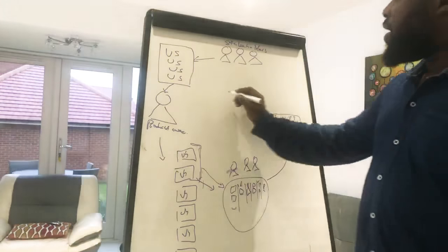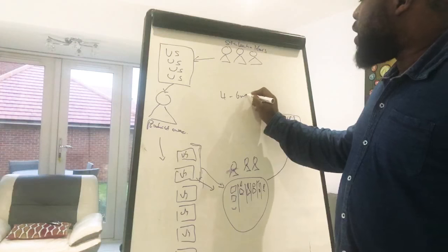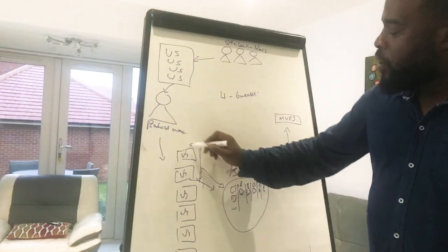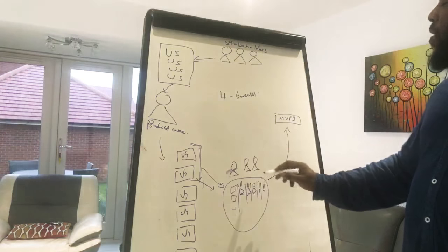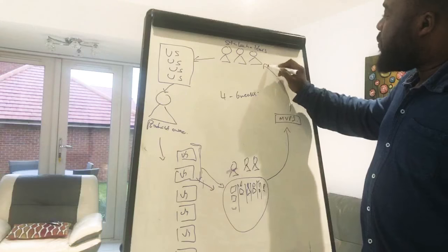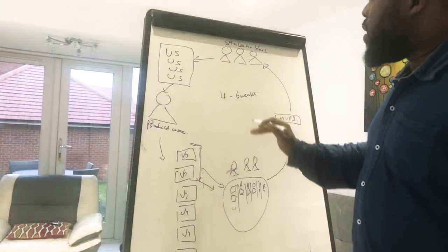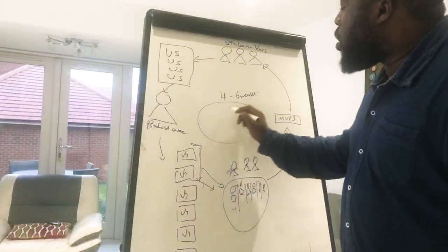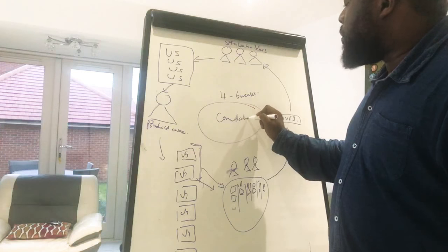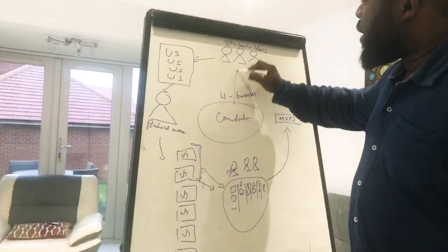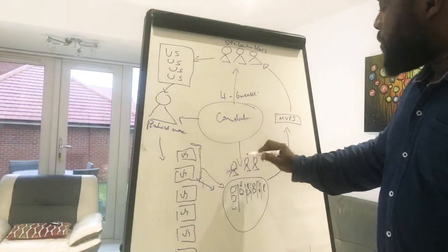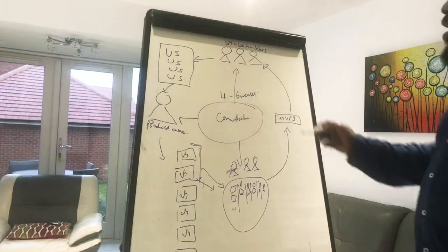So you're looking at a 4 to 6 week period where you say, okay, within the next 4 to 6 weeks, what exactly are we going to deliver to the customer, which is the most important thing. You deliver that minimum viable product, the customer reviews it, and the customer comes back and says, you know what... And this is where communication comes into play. There's a consistent communication line between the product owner, the stakeholders, and the development team, and they can give their feedback.